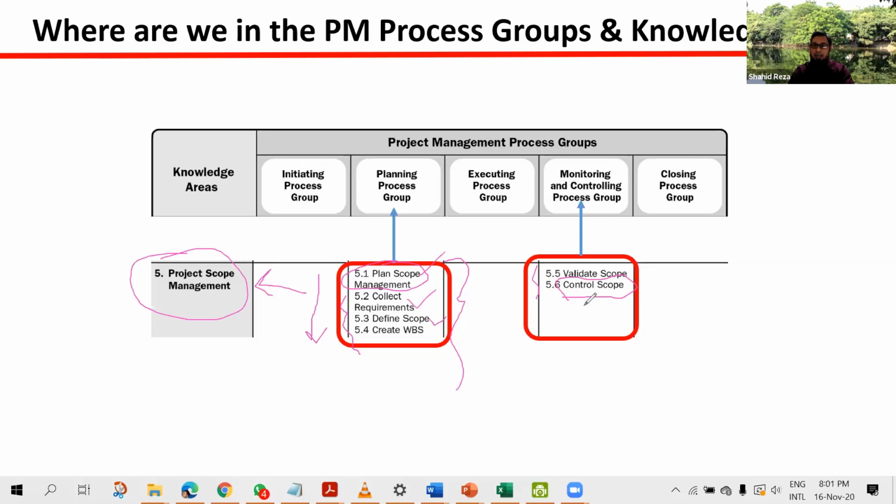As per the Timebox guideline, a baseline means an approved copy of the scope. Once the scope is approved by the customer or by the sponsor, if you want to change anything related to that scope, then you have to raise a formal change request. In predictive project management, we always try to define our scope at the beginning of the project. And if any change comes during execution, monitoring, or closing, and we see that a change is required, then we make the change with a formal change request.